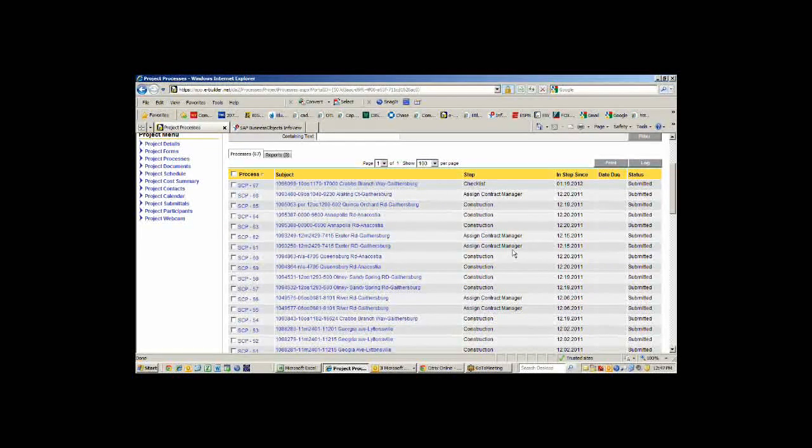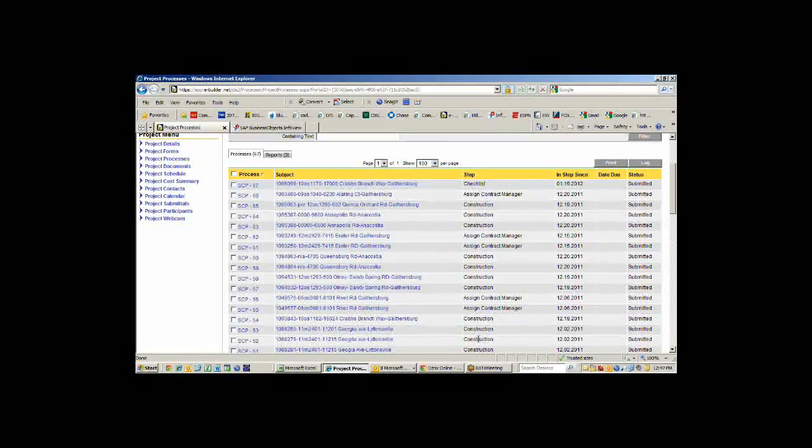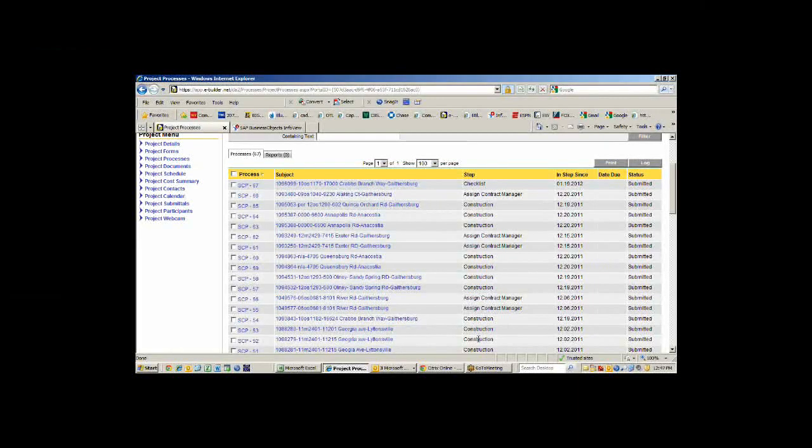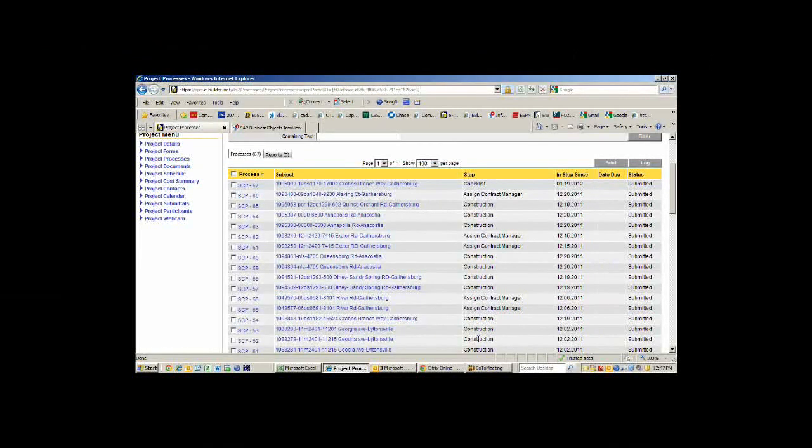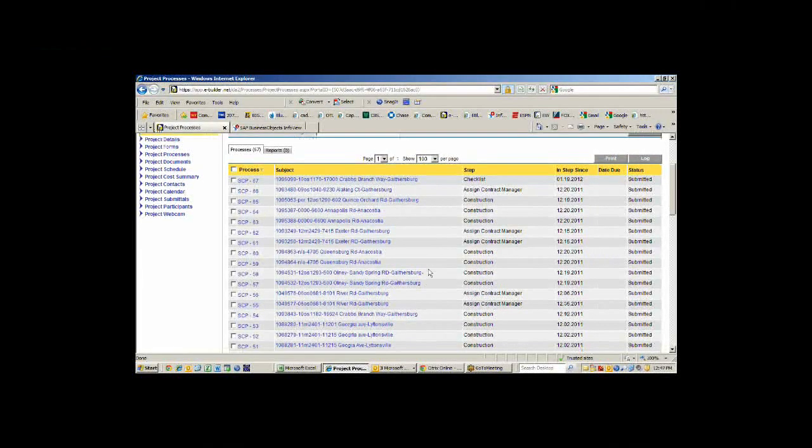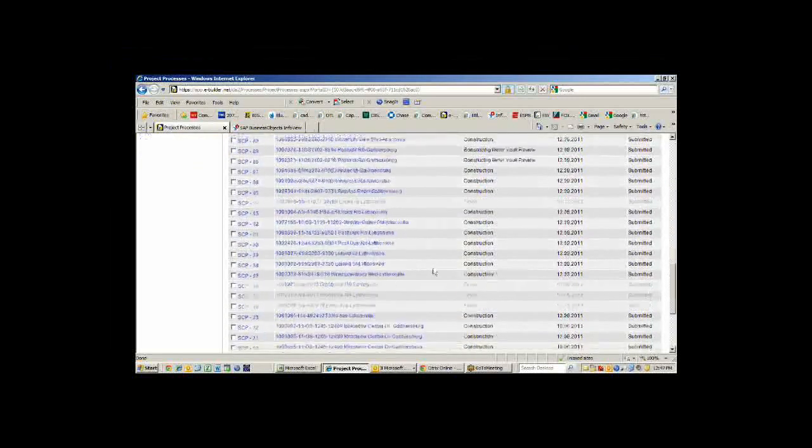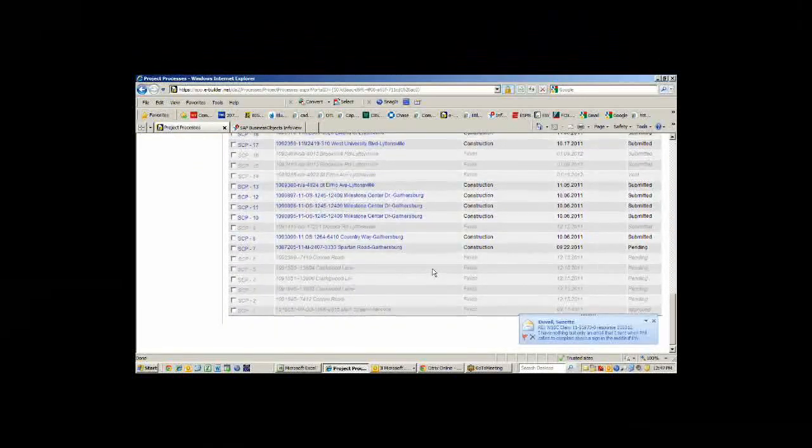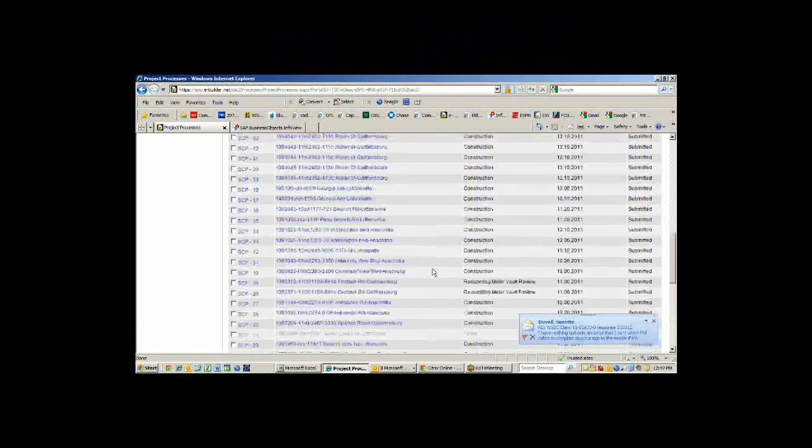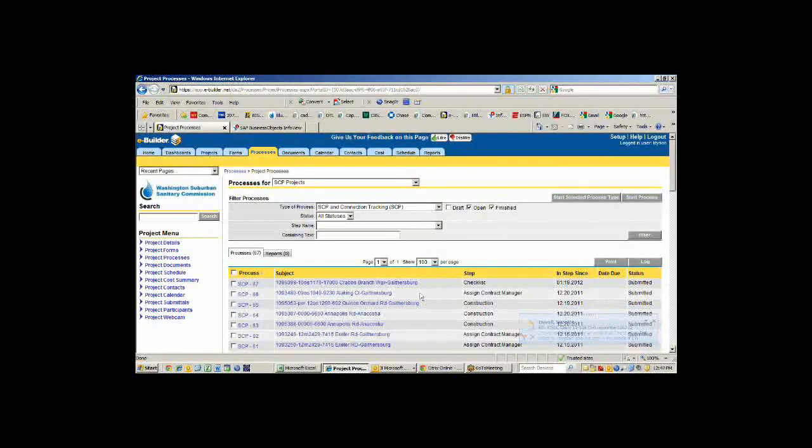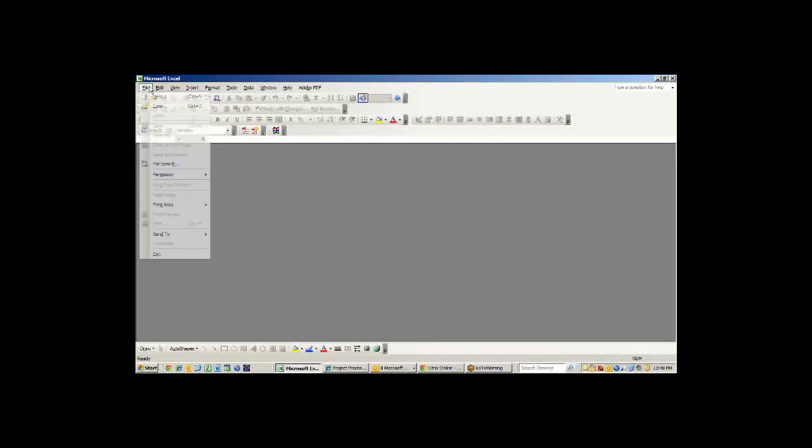This is a process when a new connection is requested by an applicant. They submit what's called a service connection package. It goes through the permitting process in our permitting group. When that's completed, then it comes up to us to do the implementation, either through our contractor or through the applicant's contractor if it's a bigger project. Here we have a list of all the different permits that are outstanding right now. We actually started this back in September. We're tracking these before we tracked them on a spreadsheet.